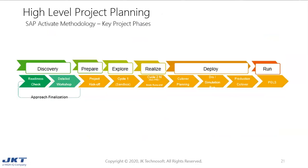The key project phases based on SAP Activate methodology are: discovery, prepare, explore, realize, deploy, and run. Moving along, we do the readiness check, then a detail workshop for approach finalization. In prepare, we do the project kickoff. With explore, we are ready with cycle one — migration of the sandbox system in the landscape. In realize, we do migration of subsequent systems in the landscape. Finally in deploy, we start with cut-over planning, then go-live and post-go-live support in run.